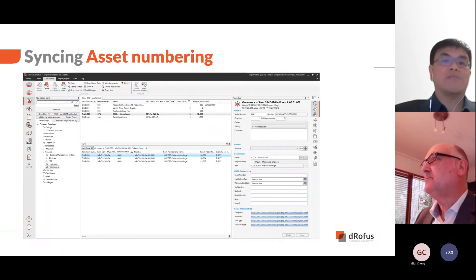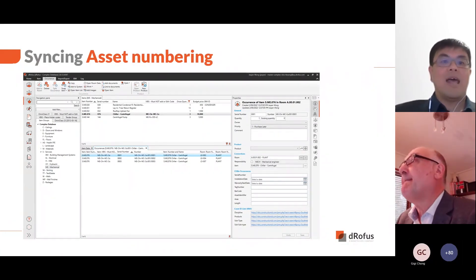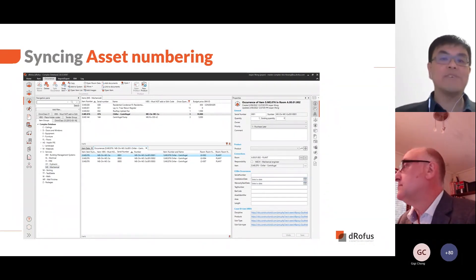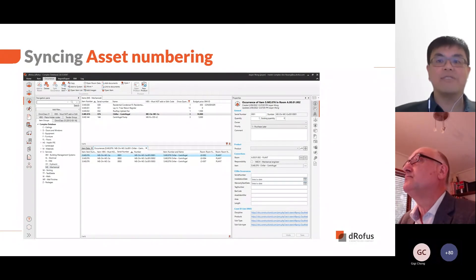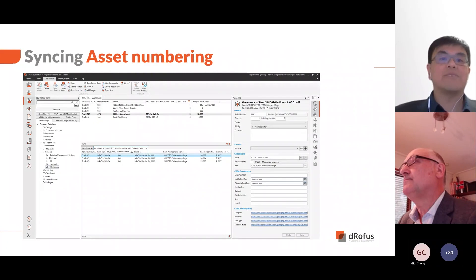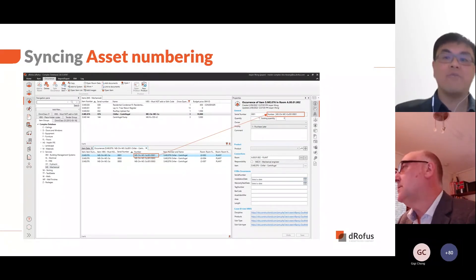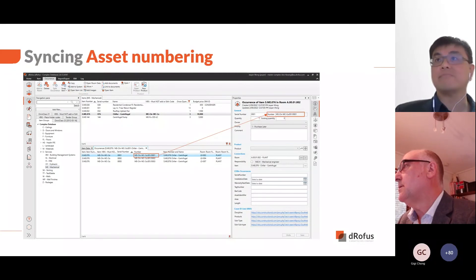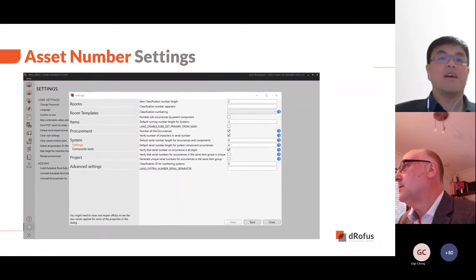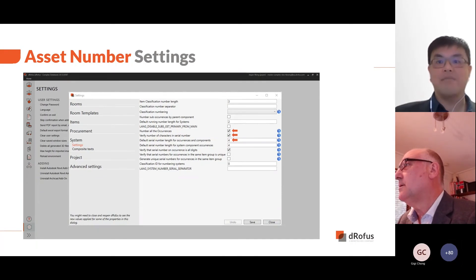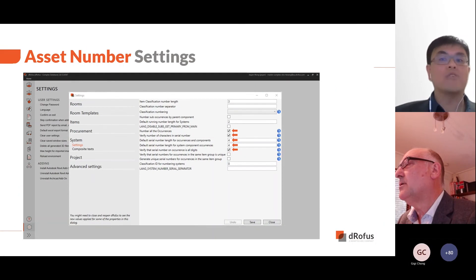We'll now move on to the next part of the demonstration, which is about asset numbering. At the handover stage, one of the activities is to create a unique asset numbering for various elements — this can sometimes be a challenging task. Within the software, we have developed an asset numbering system that can include the classification in the final number. This asset number can be used to track elements on site or be synchronized into geometric models for easy identification and coordination. To have the auto-numbering function working, there are a few settings to activate, such as ensuring the classification is auto-generating numbers and set up for occurrence numbering. Please reach out to our customer success team after the webinar — they will be more than happy to walk you through the setup.